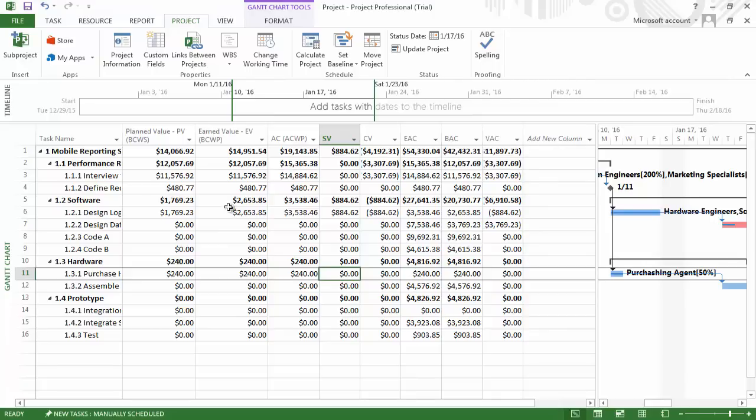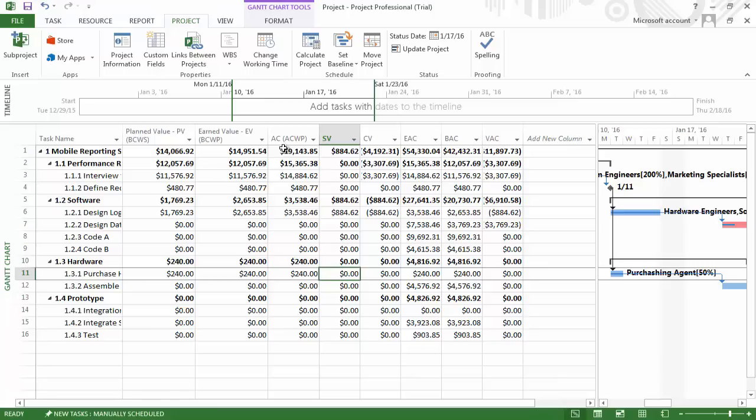If we look at this report by January 17th, we planned to spend roughly $14,000. So far, the earned value is almost $15,000. Earned value can also be interpreted as the planned value of the work we have actually completed. We can see here that the actual cost shows us we have actually spent a bit over $19,000.